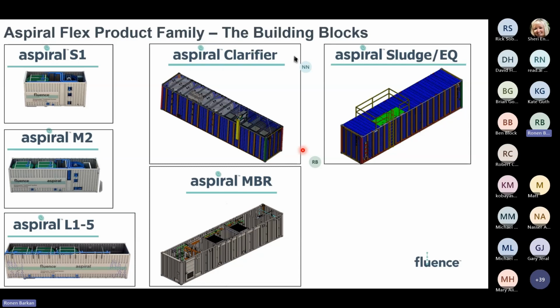Additionally, building everything in such a block helps us design everything in advance and pre-test everything in our factory. And so the labor associated with the installation in the field has been reduced quite significantly compared to other typical package plants. Because another aspect that we've seen is that labor is also a very expensive component. And so if we're able to reduce the amount of labor dedicated to installing these package plants, again, we're reducing the overall price for the entire project. Those were some of the drivers that led us to develop this building block approach.